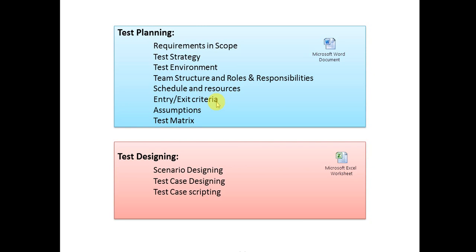Entry criteria and exit criteria will be covered. For entry criteria, test environment supply is a must. For exit criteria, we can define at least 98% test results as an example.